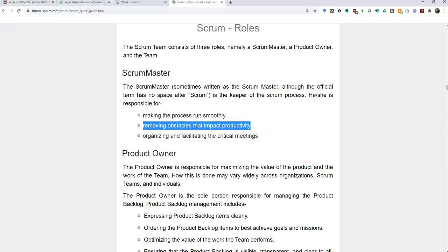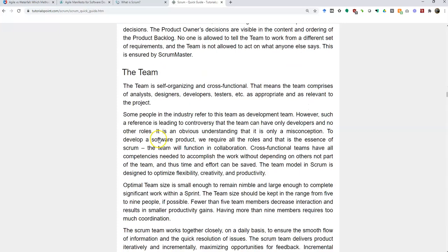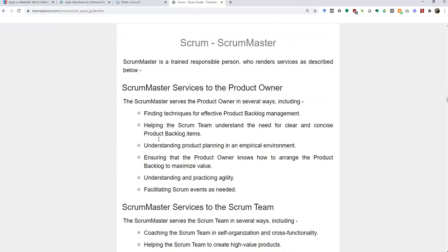I mean, maybe he's forced to because his boss is like, this has to be implemented. But even if it has to be implemented, the product owner says, okay, I'll put this in at this point in the product backlog. But my team is not going to deal with this until the next sprint starts at the earliest. So I don't know if I'm going into too much detail here,